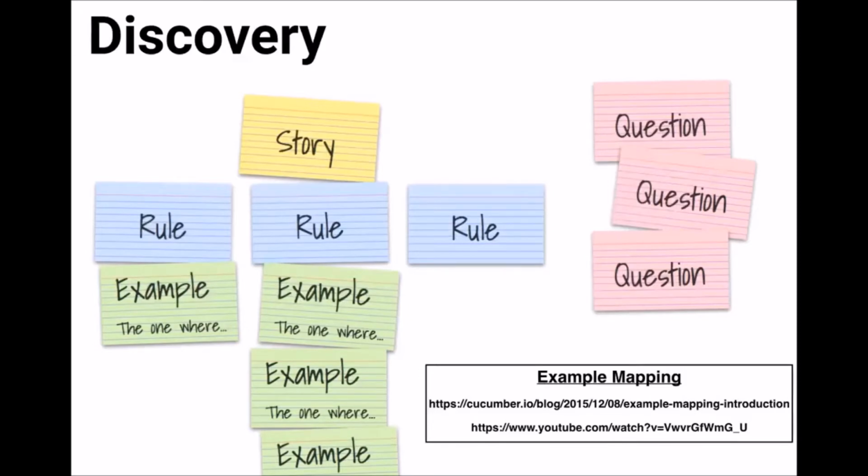If you've got a lot of pink cards, well, there's probably a lot of outstanding questions. You don't really understand this story well enough to work on it yet. If you've got rules that have got no examples on them, well, how are you going to test that? You haven't thought about it yet. So you get really wonderful visual feedback from this.